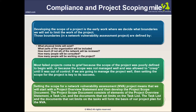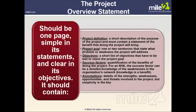Managing the project well means setting the scope is key to success. Setting scope for the network vulnerability assessment means starting with a project overview statement, then developing the project scope document. The scope document consists of elements of the project overview statement, a task list, and documents that set limits on tasks forming the basis of the project plan. The project overview statement should be generally one page, simple in its statements, clear in its objectives, and contain the project definition.